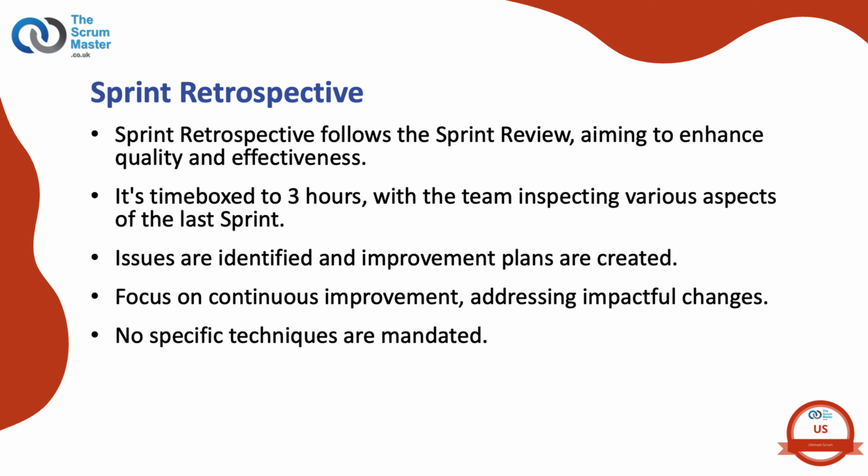In the sprint retrospective, the Scrum team inspects how the last sprint went concerning individuals, interactions, processes, tools, and their definition of done. Inspected elements often vary with the domain of work. Issues are identified and their origins explored. The Scrum team may discuss what went well during the sprint, what problems it encountered, and how those problems were, or were not, solved to identify the issues they want to focus on.